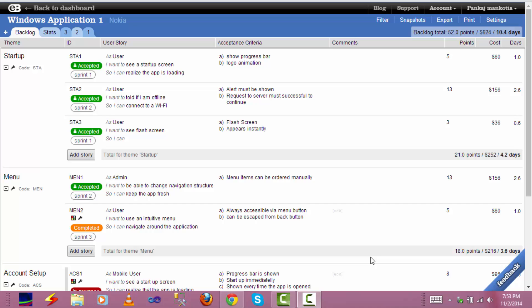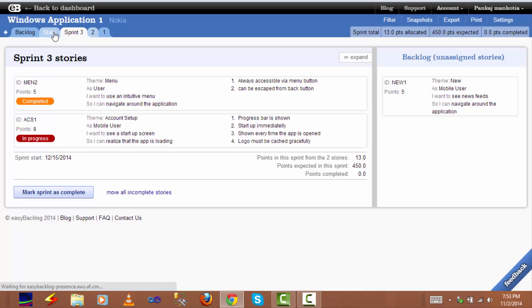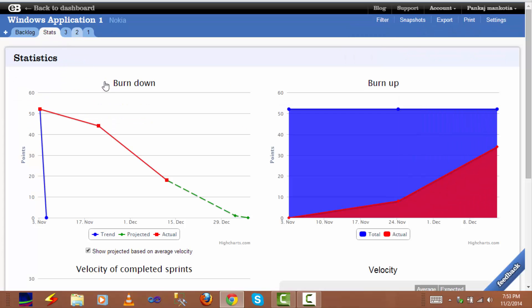Easy Backlog creates burn down and burn up charts automatically. As the project progresses and we start completing sprints, statistics and graphs relating to the progress of our project will be shown in the stats tab. The burn down chart shows our actual progress versus our projected progress, along with a projected line demonstrating when we are likely to complete at our current rate.